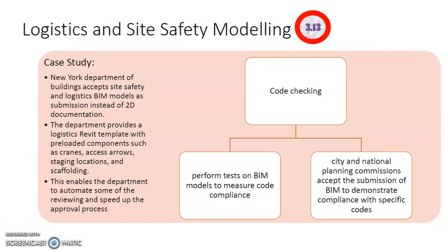VDC services can also offer logistics and site safety modeling, where you actually model the construction site to allow for the transportation or the logistics to be done in a safe manner. You model the whole site to allow for the site safety to be taken into consideration during the day-to-day work.